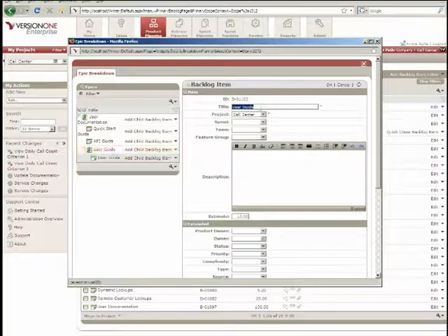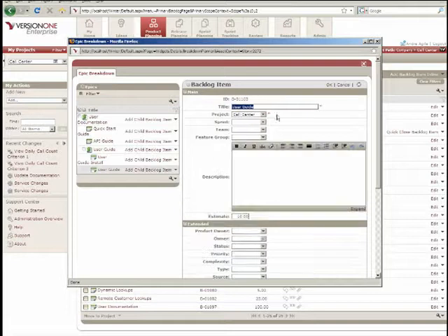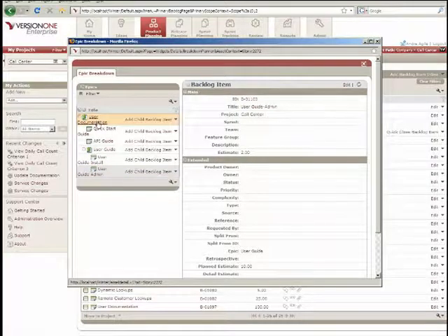In other words, we're creating a hierarchy of epics. Let's say we're going to do the install section, and that'll be a 2. And let's create one more here under user guide. Let's say the admin section, and make that a 2. So now you notice we have this hierarchy building. The icons of the book mean it's an epic, and underneath the epics you see the icons of the stories.